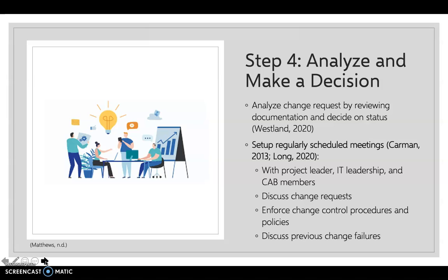All members at the meeting should be able to review a copy of the change request form and the evaluation matrix to assess how the change will impact the employees in their specific departments. I would suggest scheduling monthly meetings to keep up to date with change requests, but if there's a request that requires more attention, weekly meetings should be considered until a final decision is made.